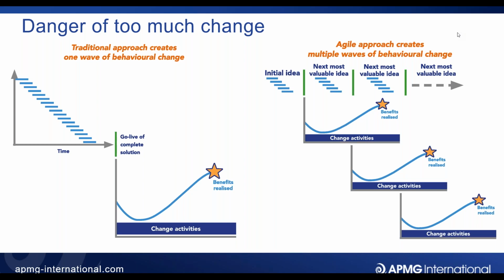And the second thing is that I often find there are diseconomies of scale, because as I move on to the second idea, I might have to unpick some of the things that I've done already so that I can expand it and make it more available to a wider customer base, perhaps, or include other things in it.